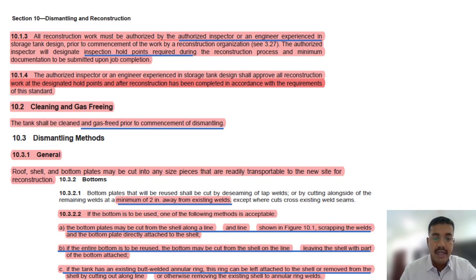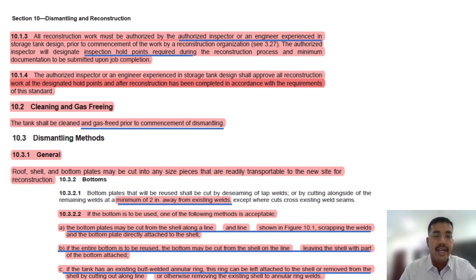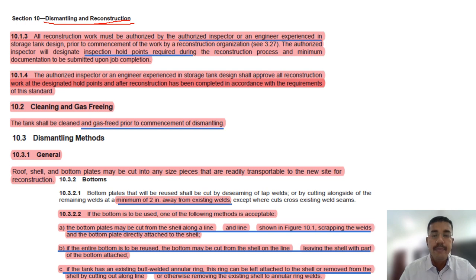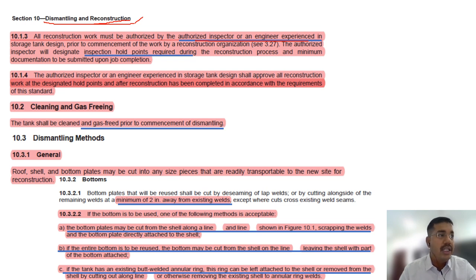Let's start with Section 10: Dismantling and Reconstruction. API 653 covers repair, alteration, re-rating, reconstruction, and relocation. For reconstruction and relocation, we have to do dismantling. All construction work must be authorized by an authorized inspector or an engineer. The procedures, method statements, and ITP should be approved by these parties. This is the same concept repeated from the last chapter.